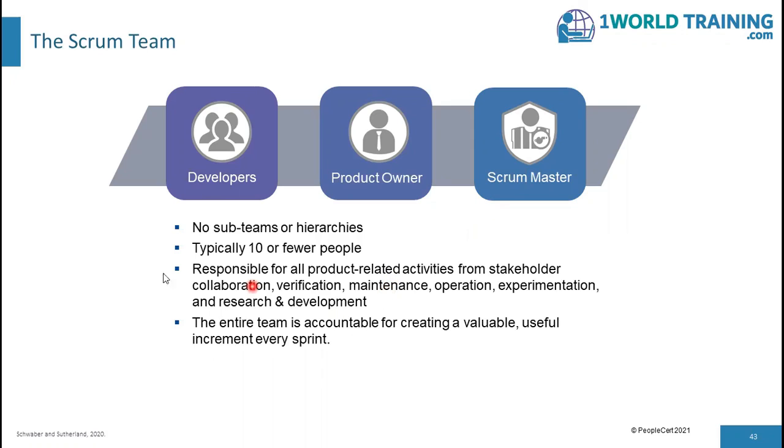Reiterating why the team size should be less than 10. Because smaller teams communicate better and they are more productive. Larger teams require more coordination and they generate too much complexity for an empirical or an observation-based process to be useful. If Scrum teams become too large, they should consider reorganizing into multiple cohesive Scrum teams, each focused on the same product.